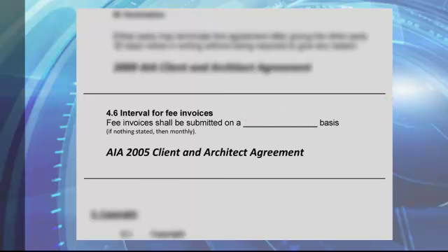Now, obviously, if you're working on a very small project that only lasts for, let's say, a month, it may be more appropriate to ask for 50% of the fee up front and 50% at the end of the month. So once again, what may be considered fair and reasonable does depend on the size and type of project.